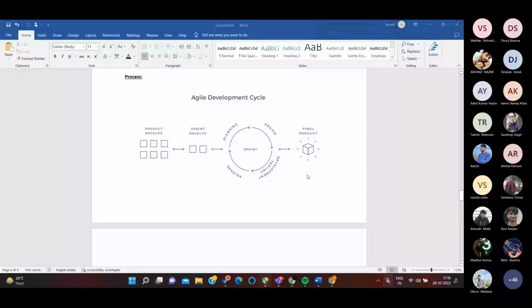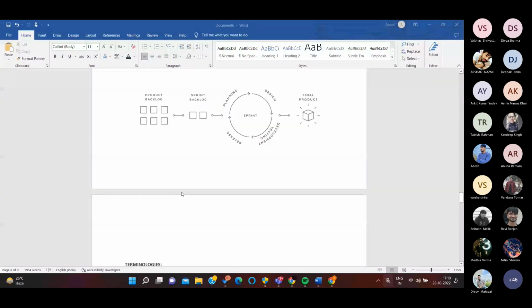No, exactly. If I tell you briefly, these are different things. The BRD and PRD only describe what the requirement is, what the business perspective of that is, how it will affect the overall product we are building, and the overall flow of that particular requirement. But what the user story tells the developer is the exact deliverables that need to be done within a particular sprint.